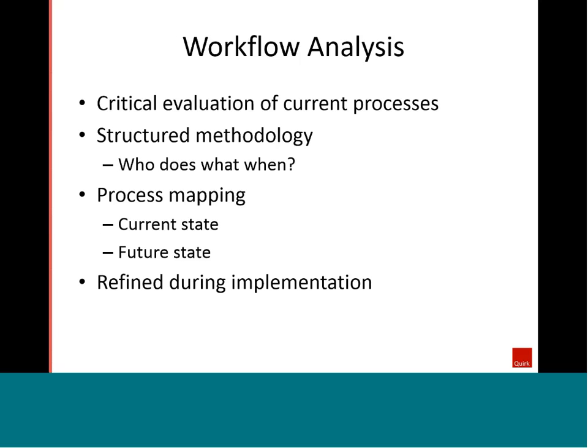So workflow analysis is basically a critical evaluation of current processes. And if this is something that your organization has not engaged in, and all your workflows have just been handed down from one generation of employees to the next, this would be a good time to do a very comprehensive workflow analysis. And in the implementation process, this is something that needs to happen before you start looking at doing any kind of testing.